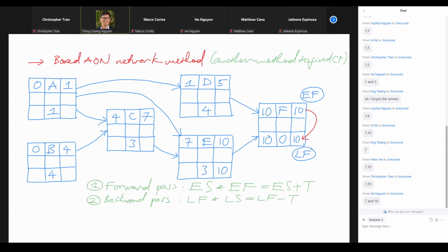Okay, so we backtrack by 3 weeks, then we have 7 down here. So as the latest, we start E at the end of the 7th week and finish E by the end of the 10th week, so that we can start F at the end of the 10th week. So they will finish the party, and after that they will fly out to the honeymoon destination, right? All right, so that's the E activity.